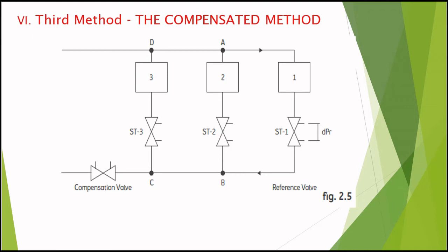For this reason, several calibrations are required, with a consequent waste of time. The compensated method prevents such a disadvantage, making it possible to perform a one-time setting. So the compensating method is very important. That's why it is saving our time.